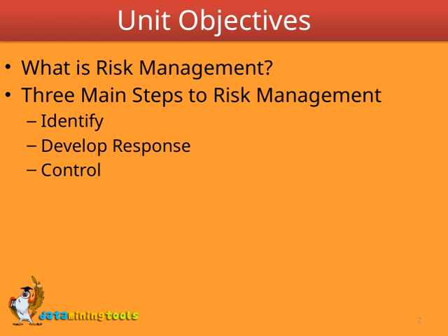Once we've identified the risks, we need to plan how to respond. That can mean avoiding the risk altogether, reducing its impact, or preparing contingency plans. The goal is to be proactive rather than reactive.